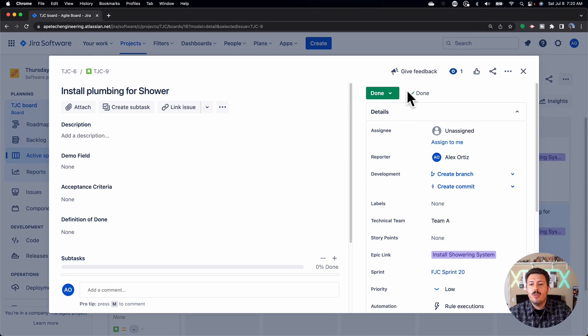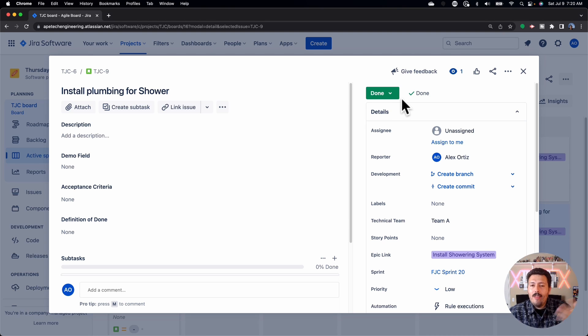What if sometimes you want to mark things as done, but not just 'done'? Maybe they're a won't do, a cancelled, a rejected, or a duplicate. Sometimes you don't want to call it done — you want to call it something else. So let me show you how to configure what options you have with respect to your resolution, and then I'll show you how to change it so that when you move an issue to done, you can set what kind of done it is — duplicate, cancelled, rejected, no longer applicable, whatever you want.